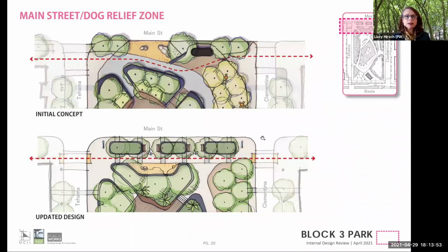And then what was represented at the last meeting is on the top section here, and this is our update. So 3 key components changed. Number 1 is the removal of the prefabricated restroom that is part of an overall program in the city called DECO. We have subsequently learned that they no longer have additional DECOs as part of the contract. The contract is only for replacing existing DECO restrooms.